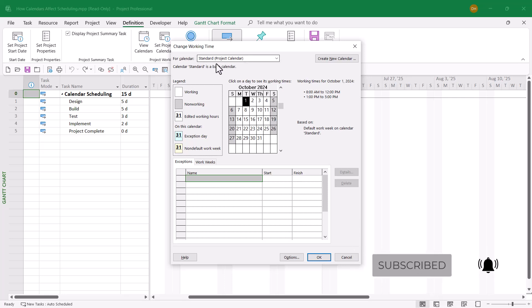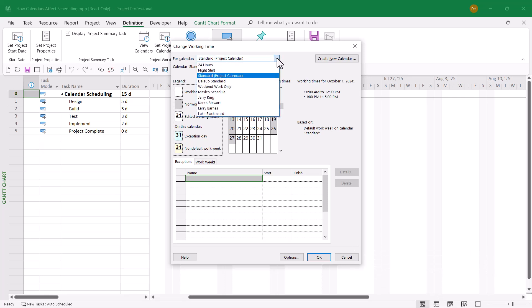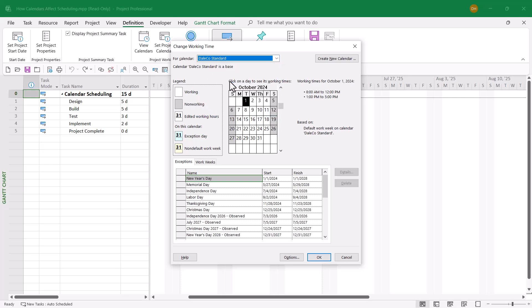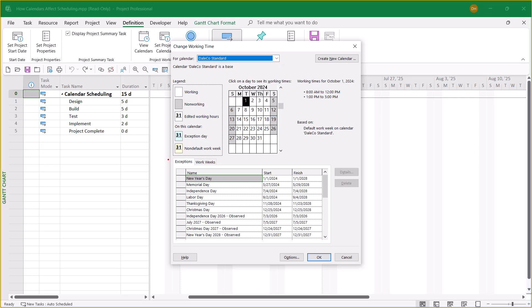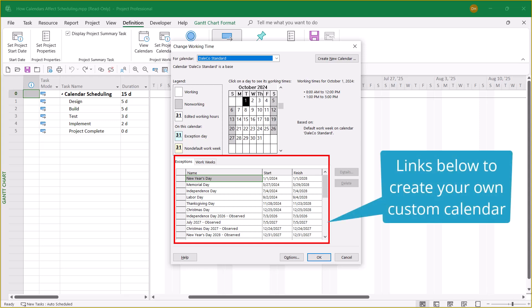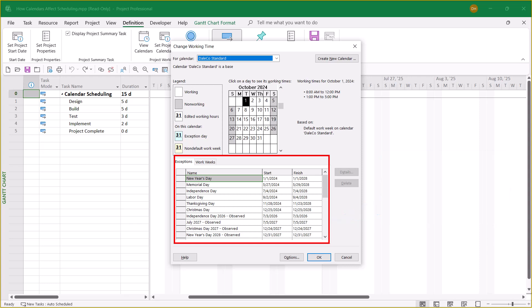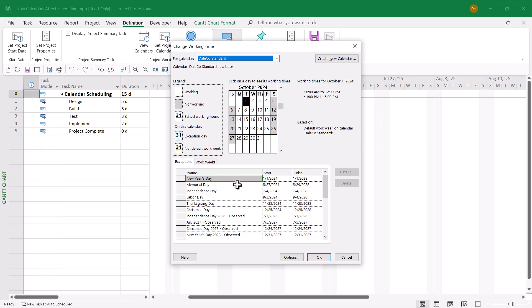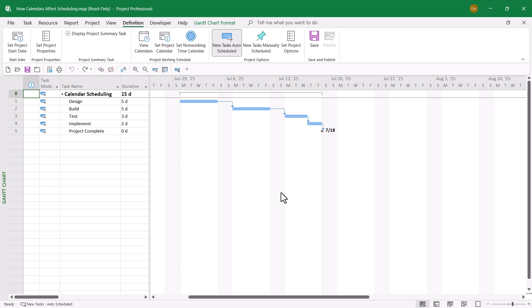This calendar has no exceptions listed — no company holidays. That's not good. If I click the For Calendar Pick List button and choose Dale Co. Standard, notice now that the Exceptions grid shows company holidays spanning from 2024 through 2028. That is the calendar I want to use for scheduling this project. So to get out of the dialog, I'll click the Cancel button.